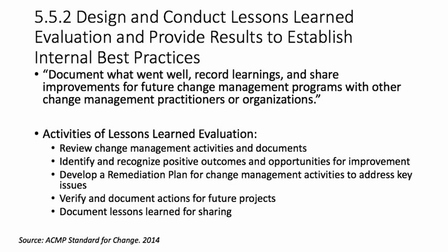Next, design and conduct lessons learned evaluation and provide results to establish internal best practices. The purpose of conducting lessons learned is to evaluate the success or adoption outcomes of the change management program, document what went well, record learnings, and share improvements for future change management programs with other change management practitioners or organizations. This step is conducted by the change management lead in concert with the project manager when possible.